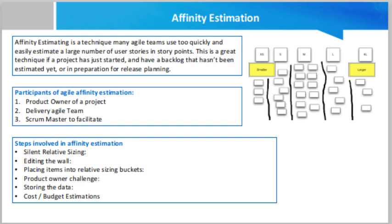The purpose of an estimate in the corporate world is to enable the sponsor to set aside a budget for the entire initiative, not just the current iteration. Entire projects are both time-bound and cost-bound. The client sets the budget that regulates the features included in the project. In the agile world, the team starts with the sponsor's available budget and determines what can be delivered within that budget.